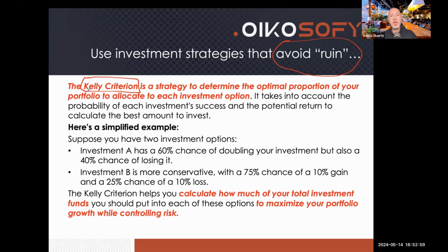When a project is late, we start putting more money into it. That's called the sunk cost fallacy, right? Like we've already invested so much, we should put more money into it. No, at some point you should stop investing into it. There's no point in throwing good money after bad money, right? So Kelly criterion is already a very well established strategy to manage investment portfolios that we could start using already. It's already defined, it's already proven, it's there, and we could start using that to manage our investment portfolios when it comes to projects or features for a product.